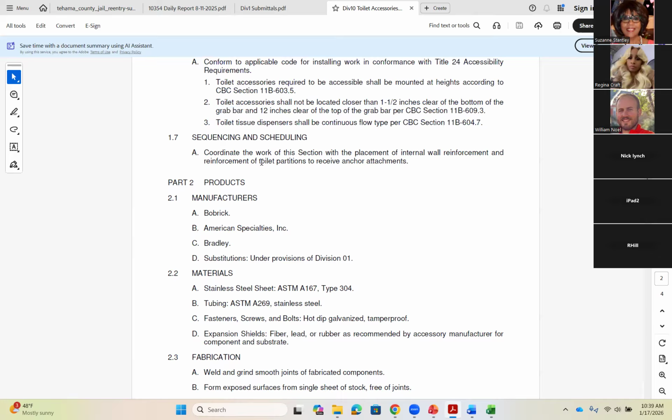Because the approval from the design team is your official notice that you can move forward with what you've submitted on. And until you get that, there's no guarantee that what you priced is exactly what they're going to accept. So yeah, it is 100%. And I have a kind of schedule in here in a little bit. After you price all this stuff out, and let me back up a bit more.